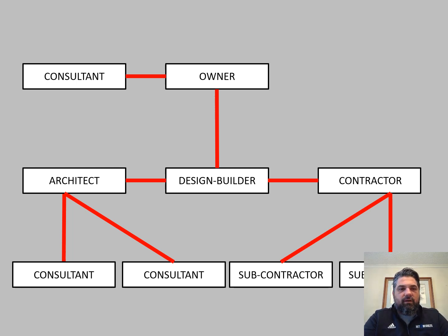And so the advantage there is that, if you can imagine that here, I'll do it this way, the involvement of the bridging architect is substantial at first and then narrows as the project continues on, and particularly as it goes in through construction. But they can be brought in at critical intervals to ensure compliance with, say, court regulations or whatever. Make sure that the design intent that the owner has requested from the beginning gets executed both through the architect of record's drawings as well as under construction.